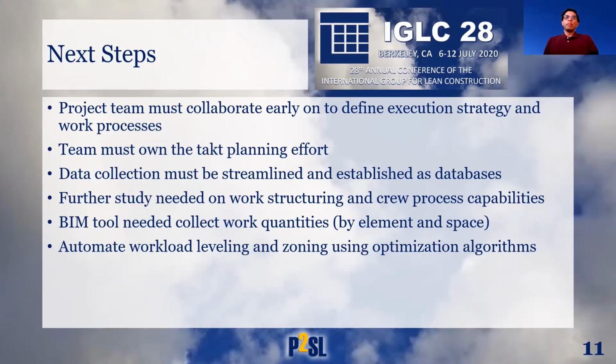The GC, along with the participating trades, should own the planning effort, contributing and understanding the process and the handoffs between the steps. They should be prepared and possibly incentivized to participate in this process, and they need to be open to sharing their production rates from past projects. A streamlined data collection process can reduce rework and upfront effort in collecting and setting up the data.